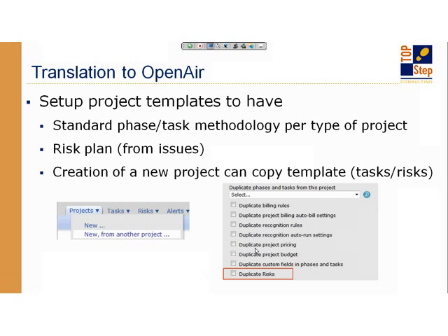And maybe that becomes part of the proposal activity within your services team. As they're working on the proposal, they're creating the project, they're filling out the risk assessment through OpenAir risks, downloading that information and including it for review by the team itself. So the risk form allows you to update and track a risk worksheet, so to speak. But because it is something that can be part of a template, you can copy over the same set of risks over and over again without having to recreate everything from scratch.